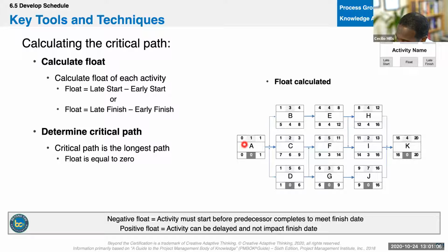Now, the second, let's say activity H takes me 6 days and I don't end on day 18, right? My critical path is now going to change. So your critical path is not static, by the way, it is dynamic. When you first create it, it's going to be static and it's going to have a 0 float. As you run your projects, it's dynamic, because things happen. You don't know what's going on.